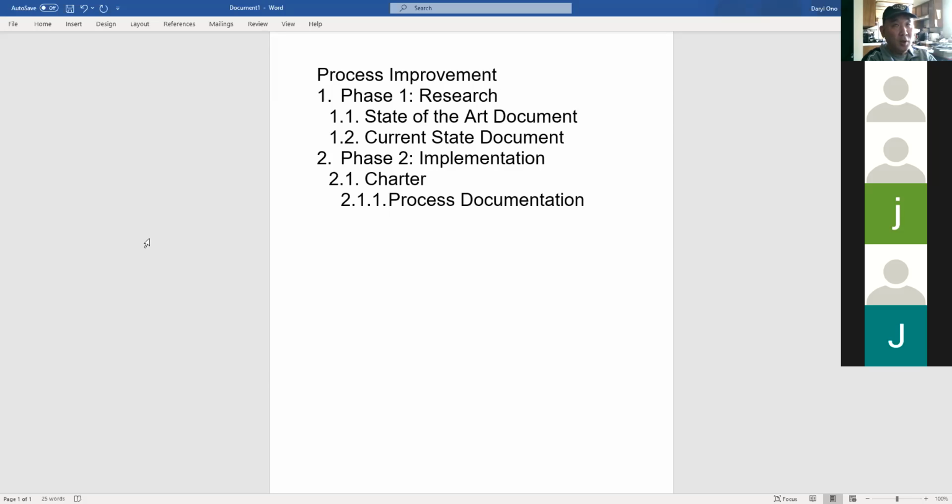2.1.1. So Microsoft Word will do the WBS coding for you. Again, you just need to go out there and type all the tasks and subtasks in the order in which they are to be performed. And Microsoft Word will do the rest for you. And again, this is in outline form. We won't do graphical form. It's best to have software to do that. I don't have the software, and you may not have the software either.